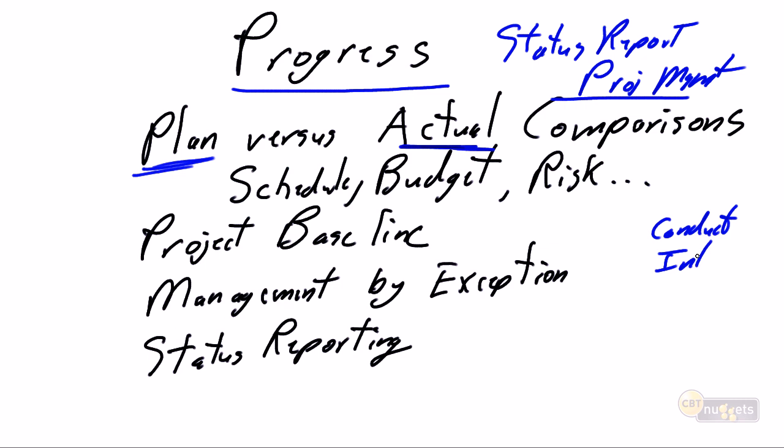So we had a plan to conduct interviews. And we're going to have Fred do it. And Fred was supposed to spend 12 hours conducting interviews. Progress is going back to Fred and getting his actuals. Fred, how much time did you spend on conducting interviews? Well, it took a little longer than I expected. A few of the people got interrupted halfway through the meeting, so I had to reschedule, and I actually spent 15 hours conducting interviews.